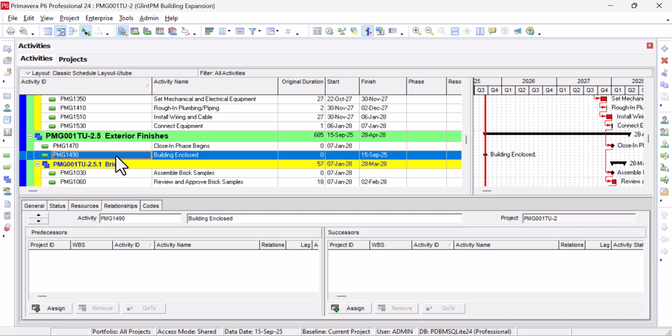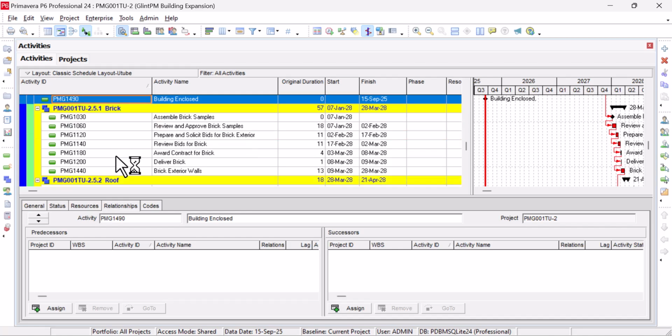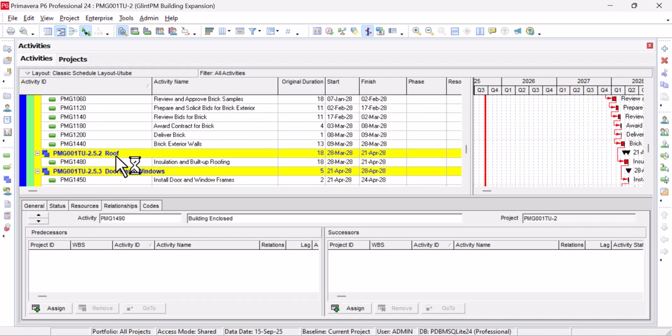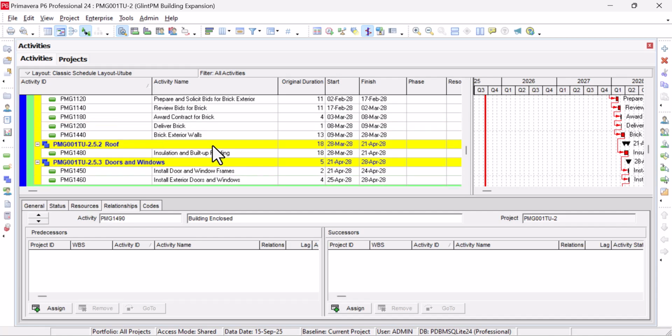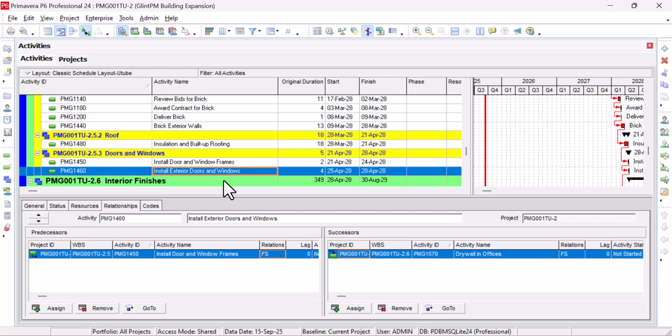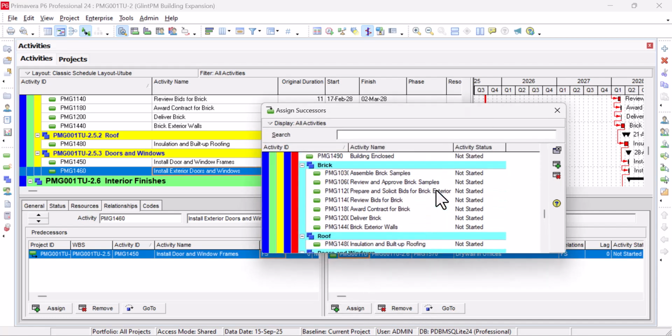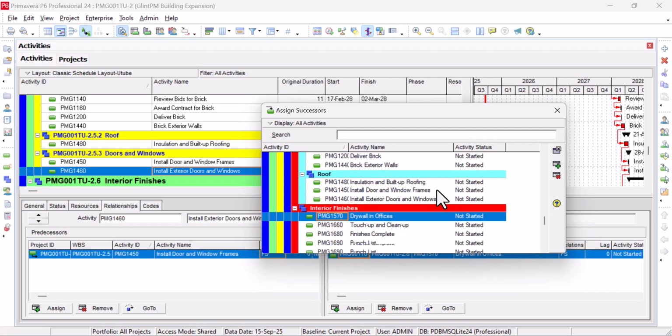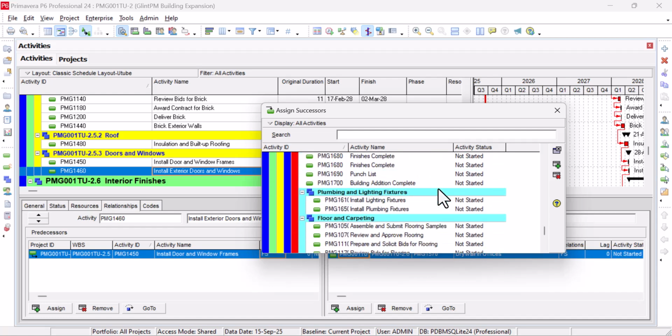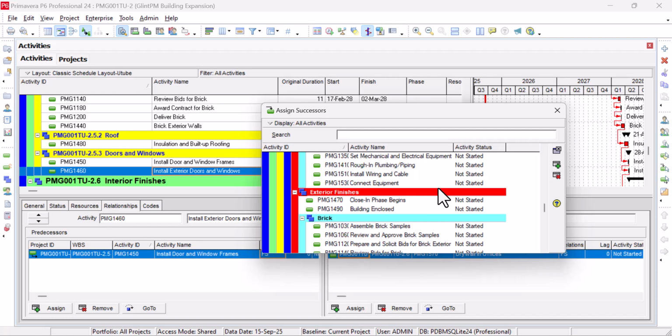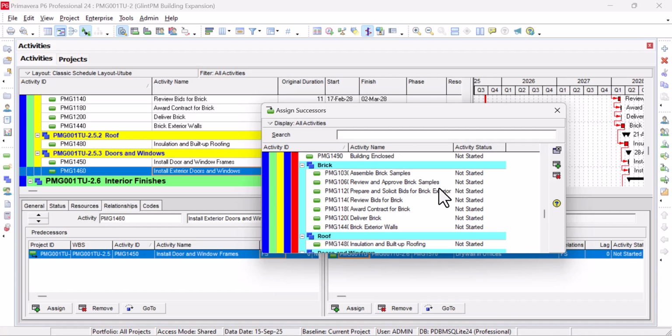That is at the basic, at the minimum. And the right practice is to have only one activity without predecessor and one activity without successor. However, at the beginning, we should establish all activities so that only one is without predecessor. Then later we can correct the ones for the successor, because it's the predecessor that is driving the critical path, that is obeying the rules of critical path method.